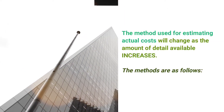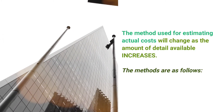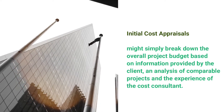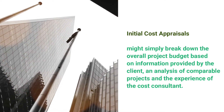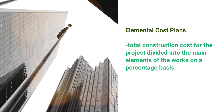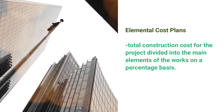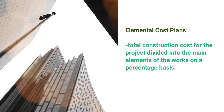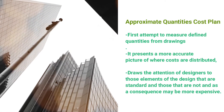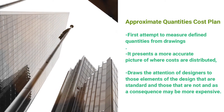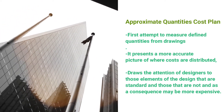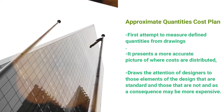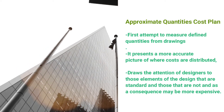The method used for estimating actual cost will change as the amount of detail available increases. Initial cost appraisals might simply break down the overall project budget based on information provided by the client and an analysis of comparable projects in the experience of the cost consultant. An elemental cost plan may simply be the total construction cost for the project divided into the main elements of the works on a percentage basis. The approximate quantities cost plan is a first attempt to measure defined quantities from drawings. It presents a more accurate picture of where costs are distributed — in particular, it draws the attention of designers to those elements of the design that are standard and those that are not, and as a consequence may be more expensive.